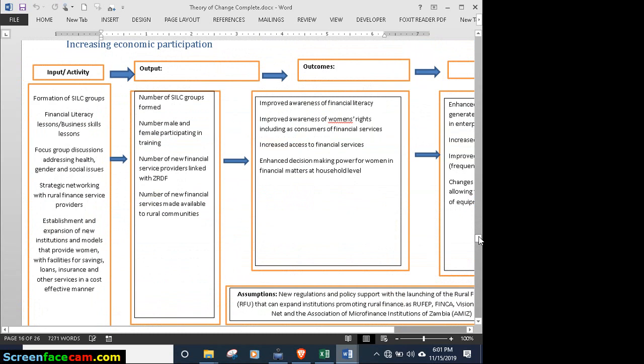Another one facing the other way. So you could draw it whichever way you feel like drawing it, but remember, it should have the key constituents of the logical framework, and it should get you from the point of understanding what your desired impact is, and you map backwards all the way to, okay, what activities do we need to do? What will these activities produce? What are the inputs that we need to have in order to achieve our desired goal?